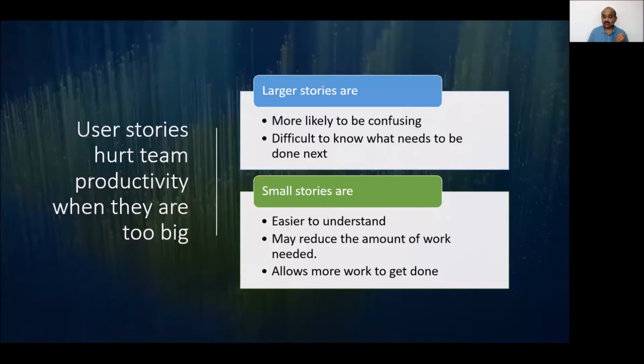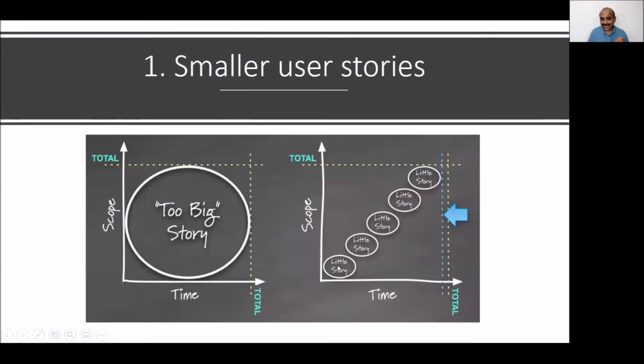And also there's more probability that you end up completing more user stories. Even in the process, if one little story got spilled over, it's only 2 story points you're pushing to the next sprint. However, the remaining user stories you're able to complete. Right, friends?